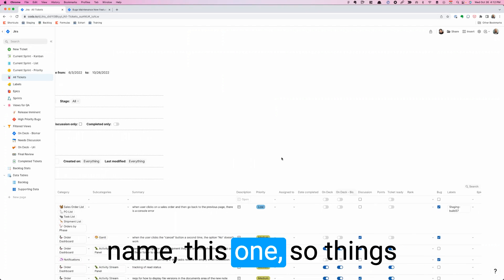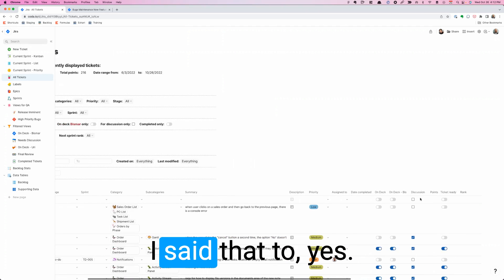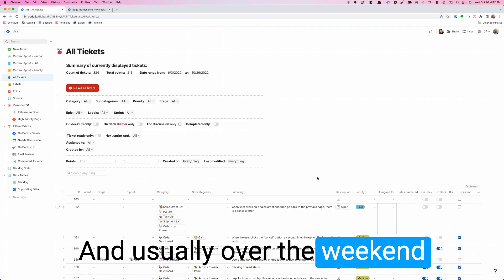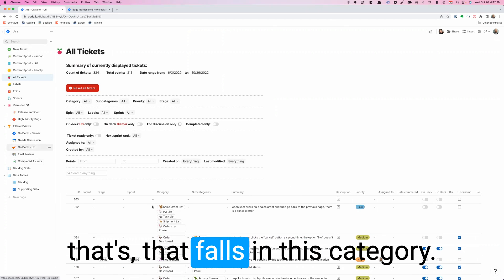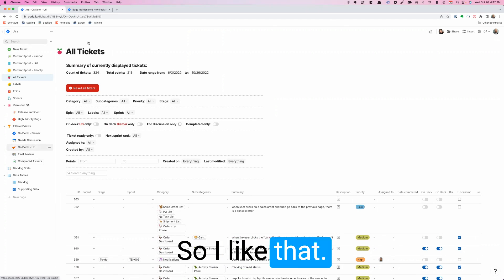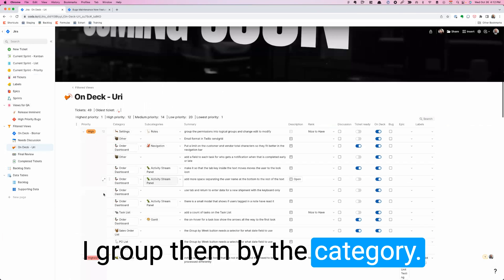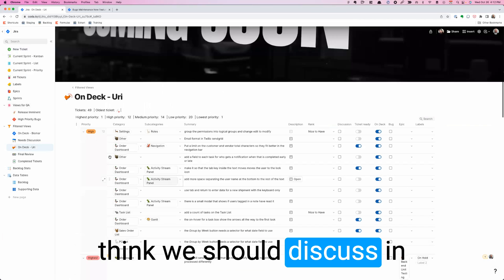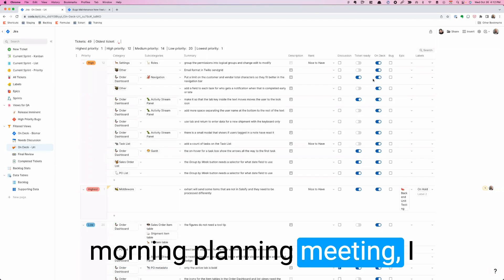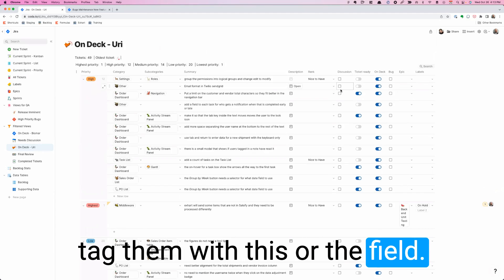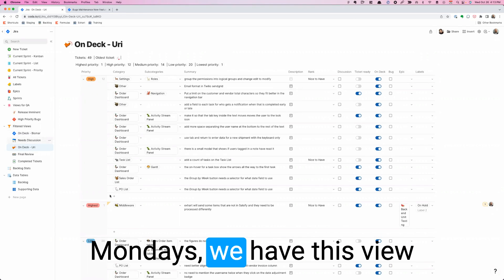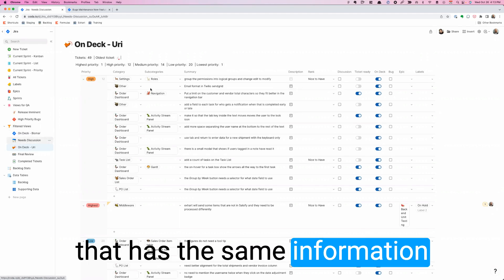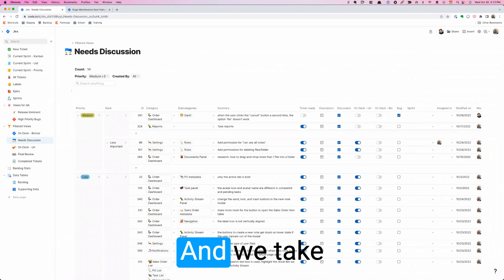I have one field that I use called On Deck with my name. Things that I'm paying attention to, I set that to yes. Usually over the weekend I end up reviewing anything that falls in this category. I like that I can see how many I have and I group them by category. The ones that I think we should discuss in the Monday morning planning meeting, I tag them with this field. When we meet on Mondays, we have this view that has the same information, and we work through the tickets, usually one by one.